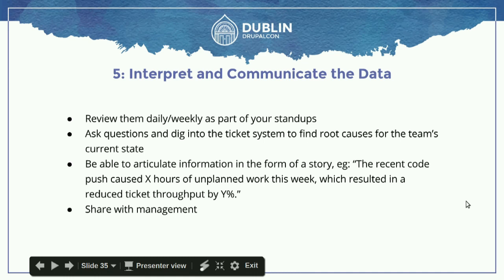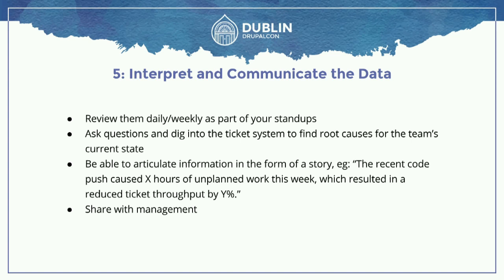So you've got all this data, you've got the dashboards, you have something to look at. Now you have to interpret it and communicate it. Reviewing them daily or weekly as part of your standups, agile process, or weekly meetings is going to be very useful because it's going to allow you to look at anomalous metrics and ask questions. You can say, 'oh, look, there was a big spike of unplanned work — why is that? Well, on that day, there were these incidents. Wow, that was really expensive. Maybe we should look into that.' It allows you to articulate the information you're gathering in the form of a story. Back in the two bears slide, just saying 'I'm firefighting' isn't very useful. But if you can say, 'this code push caused X hours of unplanned work this week and we weren't able to get those tickets out that we promised the customer' — that's a really clear story to tell.